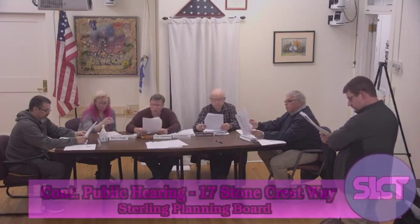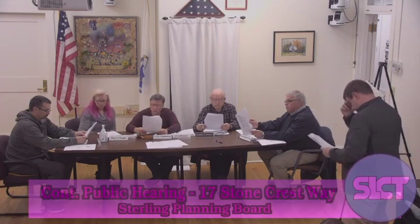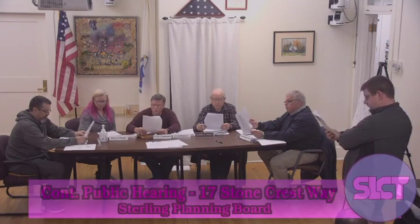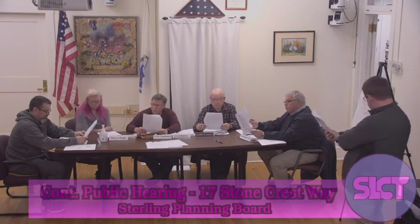The applicant shall install 2 groundwater monitoring wells for groundwater sampling, and both shall be installed in the soil overburden, not the bedrock, as shown in section 4.1, figure 4.3.1 of the Commonwealth of Massachusetts Department of Environmental Protection standard references for monitoring wells. Wells shall be installed in the north and south ends of Basin 3C in locations set by the Planning Board's peer review engineer.